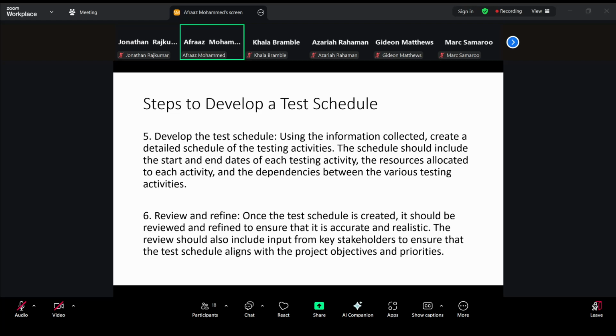So you say, well, my testing is going to take 5 weeks, but they may say, no, we want testing to be done in 1 week. And then you'll tell them, well, no, it can't be done in 1 week because of X, Y, Z. And then you have a back and forth and negotiation, and it might settle with 3 weeks or something like that, right? So there's lots of discussion that happens.